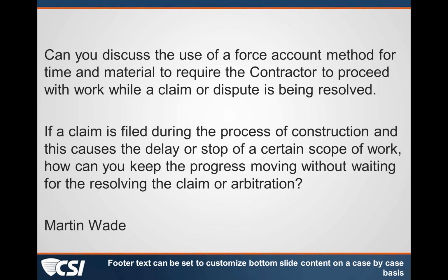So it's similar to the AIA Construction Change Directive. I'm not sure if EJCDC has a similar vehicle. I know in the state of North Carolina on our state projects, what the state uses is what they call a field order, where once that's signed and issued, the contractor has to proceed with the work, and then you work out the price later.